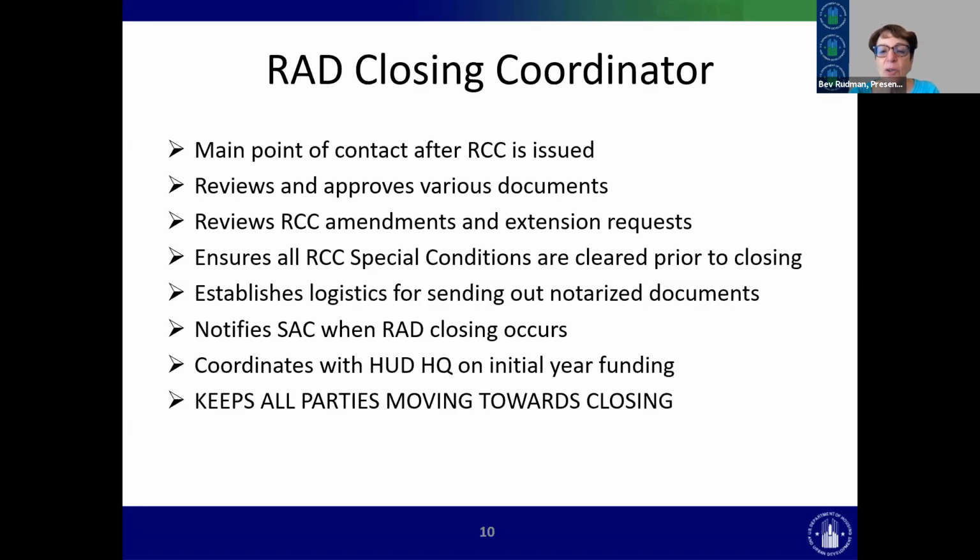But there are some things we do. Every deal, we look at various documents. We ensure that the special conditions are cleared. We establish logistics with you for the closing documents because there are still paper closing documents, and people need to realize that you've got to build in some time for those to move around. The closing coordinator will lead you through that discussion. We also notify PIH when the RAD closing occurs so that the PIC removal can be facilitated. And we coordinate on the initial year funding with headquarters.